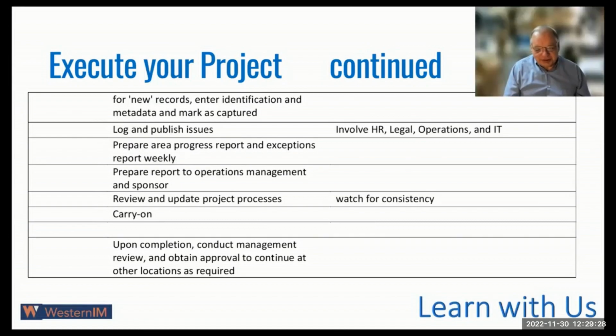Yeah, for sure, Rick. You covered off some really important points, and I just want to reemphasize two of them again. Make sure you keep track and mark the stuff that you've actually inventoried so that if you get distracted or delayed, you can come back and carry on without any additional effort.